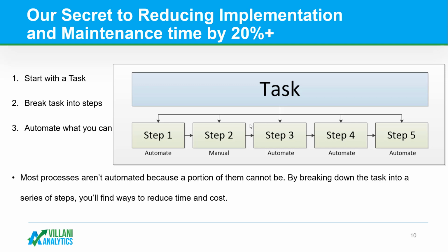So within an hour or two, we sent out an email with, hey, we automated steps 1 through 6 for everybody. All you have to do are steps 7 and 8. And as a result, the entire team, and this was over 10 or 15 people, it took 2 hours instead of 8 hours.